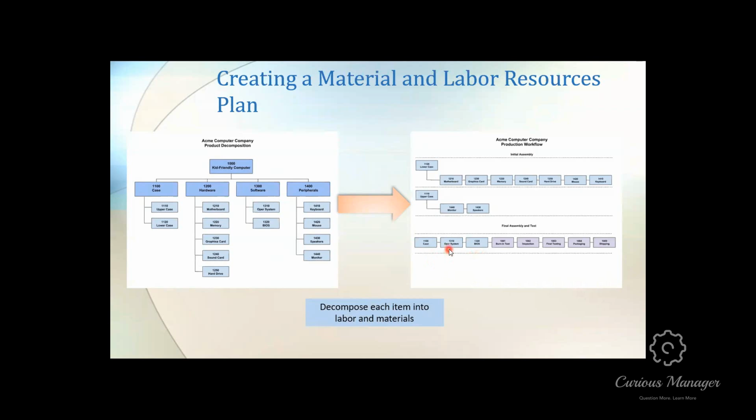Then as you do this, you may move, let's say, the BIOS and the operating system together, because they both may use different resources. So then you may move things around so that you can maximize the manpower, as long as the materials can flow through it. Like for instance, you wouldn't be able to do a burn-in test before the operating system is put together, obviously.